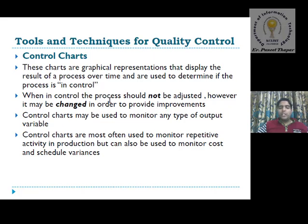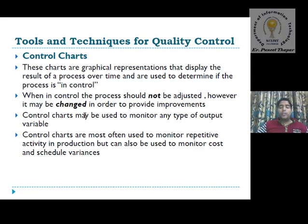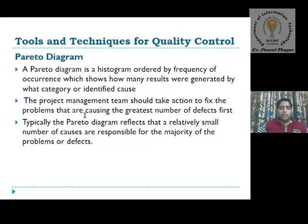Control charts may be used to monitor any type of output variables generated by quality control. Control charts are most often used to monitor repetitive activities in production, but can also be used to monitor cost and schedule variance. This is the main use of control charts.